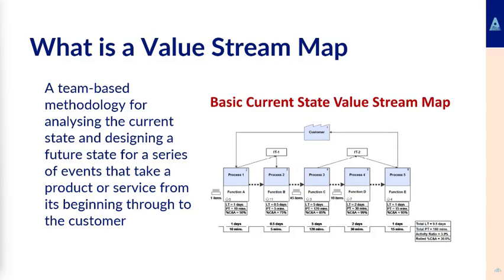So that's what it really is, and it's a map. So it's visual management. You map it up on a whiteboard and it's a team-based methodology. So basically you have the people that are going to do the work, or who can make decisions about the work, feeding in, saying, no, you don't do that, or this is what normally happens on site. We get the steel, but the steel is in the wrong place. Then we have to go back and get the dowel bars, or whatever the example is. But you have that knowledge, and you're gathering that knowledge on the current process.